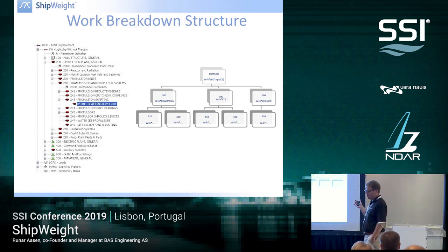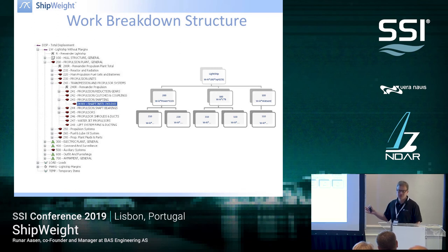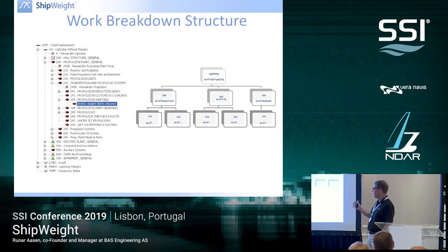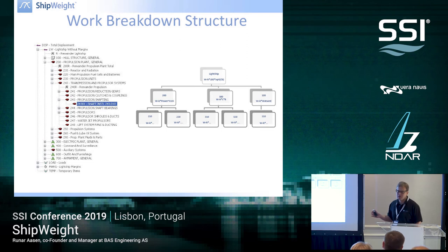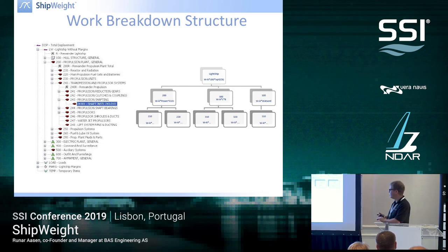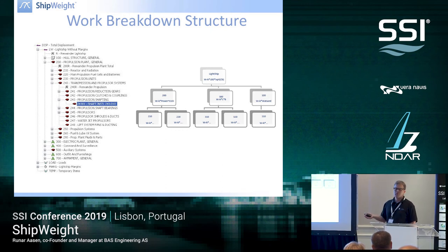When you're doing weight control, you need to have a work breakdown structure — a hierarchy of weight groups — that you use for your estimation and follow-up. You need to have at least one. There are some standards out there: SFI is a standard you could use, we have a ShipWeight standard, you could use the U.S. SWBS standard, or you can use your own in-house standard. That's perfectly fine, but you need to use one.